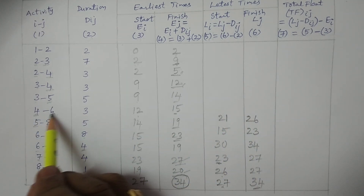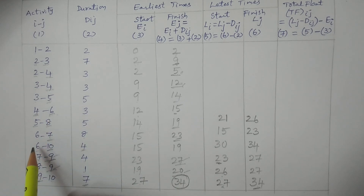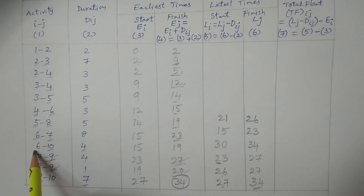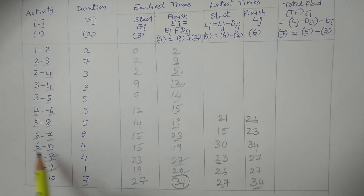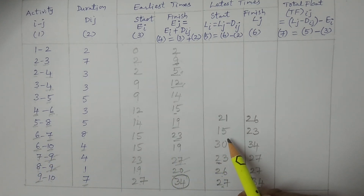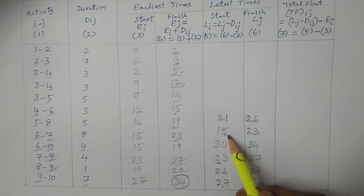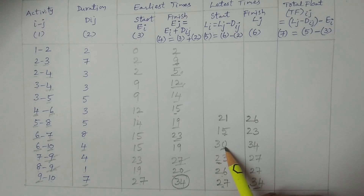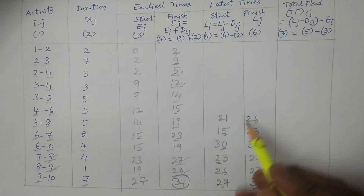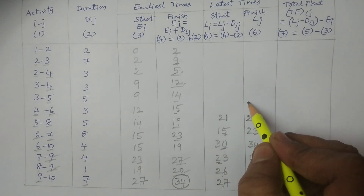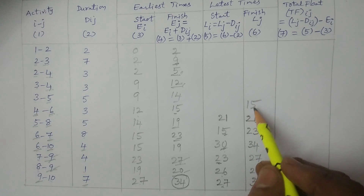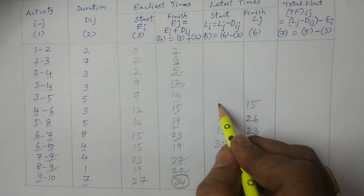For 4 to 6: L6 is required, but we have two 6's — from 6 to 7 giving 15, and 6 to 10 giving 30. For latest times, take the minimum: minimum of 15 and 30 is 15. 15 minus 3 equals 12.